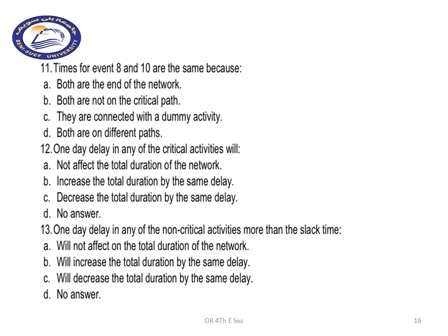For question 11, times for event 8 and 10 are the same because they are connected with a dummy activity, as you can see from the PERT network that we drew.